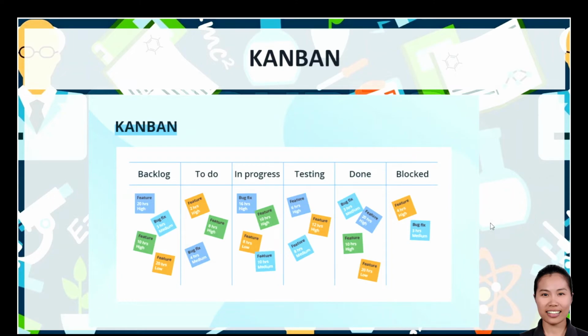So for Kanban, its key distinguishing feature is the absence of pronounced iterations. If used, they are kept extremely short, parang daily sprints. Instead, the emphasis is placed on plan visualization. The team uses the Kanban board, like this one, that provides a clear representation of all project activities, their number, responsible persons, and progress. Such increased transparency helps to estimate the most urgent tasks more accurately.